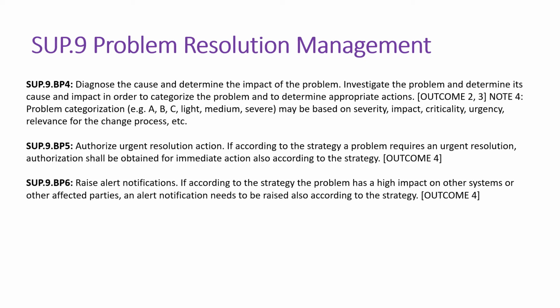And your base practice 4 talks about diagnose the cause and determine the impact of the problem. Investigate the problem and determine its cause and impact in order to categorize the problem and to determine appropriate actions. So if you have multiple problems identified, the first thing is you need to bucketize them, whether in terms of minor, major, critical, or so.